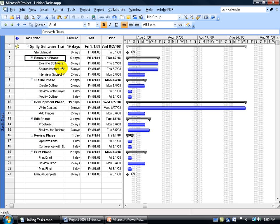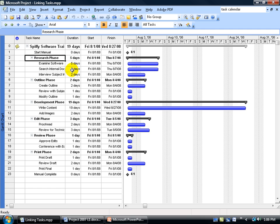Why? Well, if you start every single task at the same time, basically you're going to have a room full of people doing everything at once, or you're going to have one person doing some of the tasks and he can't be everywhere at once. For example, if I had one worker working on examining the software and searching internal documents, each of them were five days. Well, those would be 16-hour days so we can get them both completed in five days. That wouldn't work.